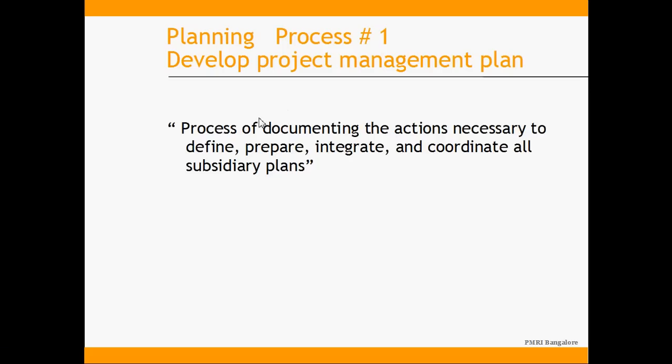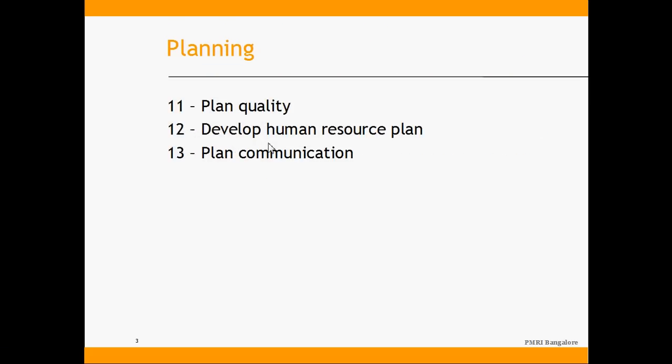Then we plan for quality, and develop the human resource plan — covering where to get people, how many, when, the release plan, training plan, and induction program. Then we plan communication. About 90% of the project manager's time goes into communication, and the basic root cause of most project issues is improper communication. So we need to plan for communication to avoid these issues.